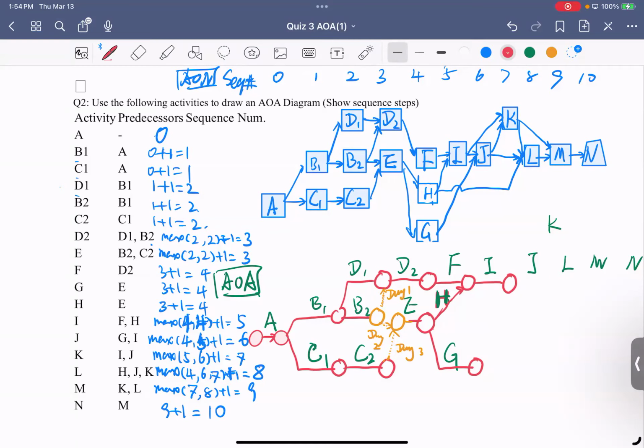If there was a dummy, would that be wrong? Okay. Don't overuse your dummy. Some dummies are not necessary. Then you need to remove the dummy, right? So like this, we can put the edge over here and put the dummy up, same as yours. And that works, the relation is correct, but we do not need this dummy.